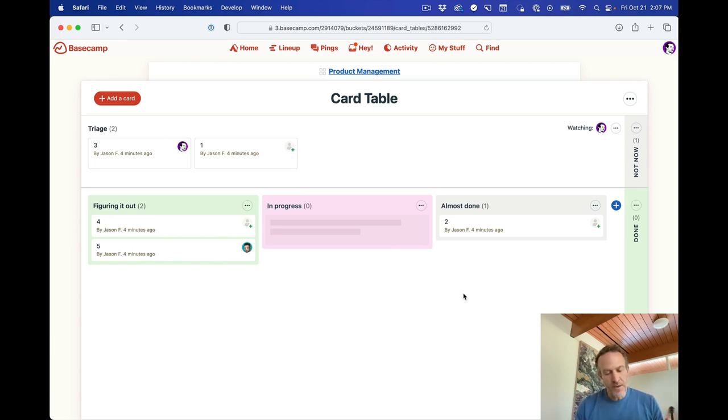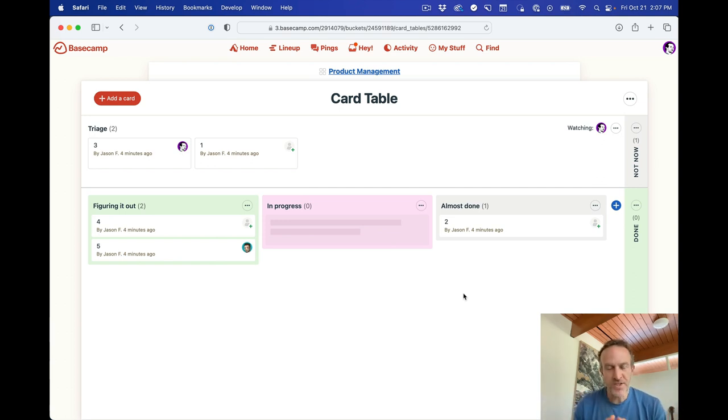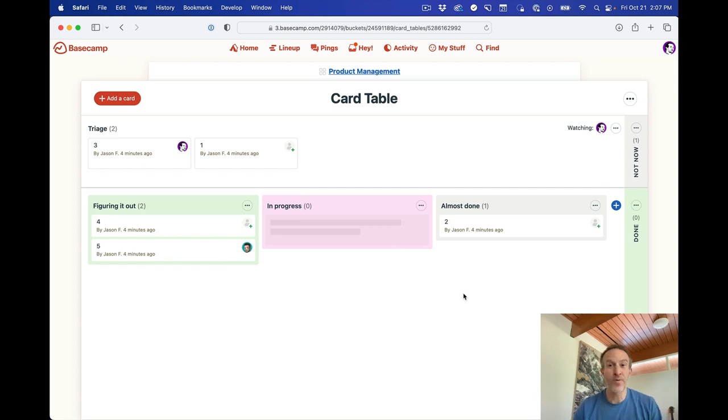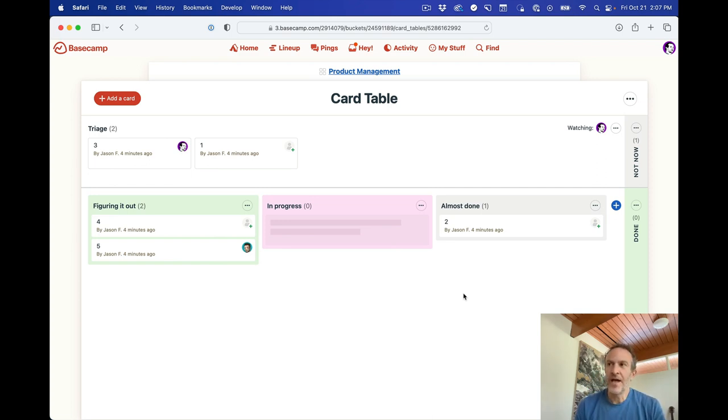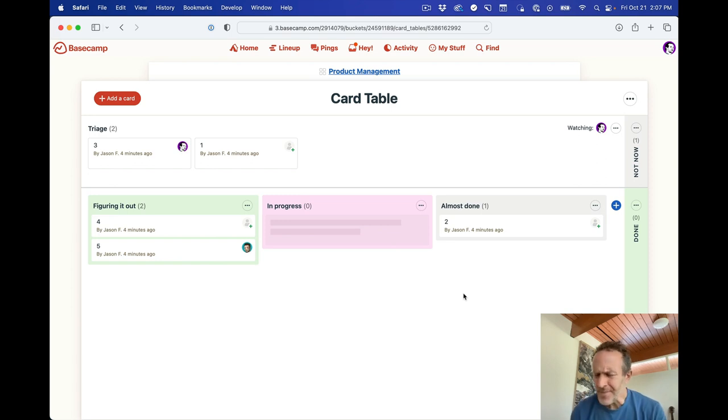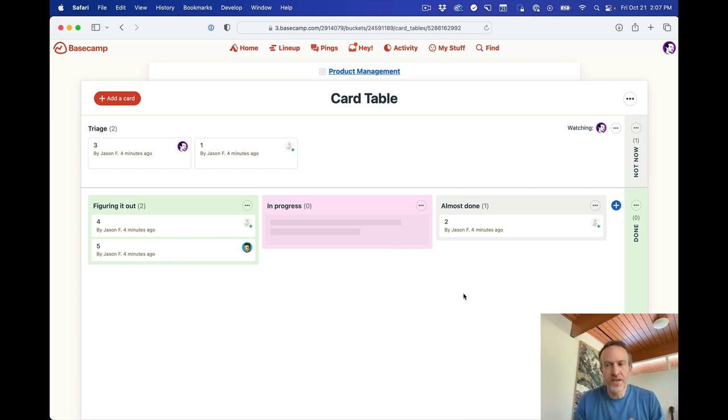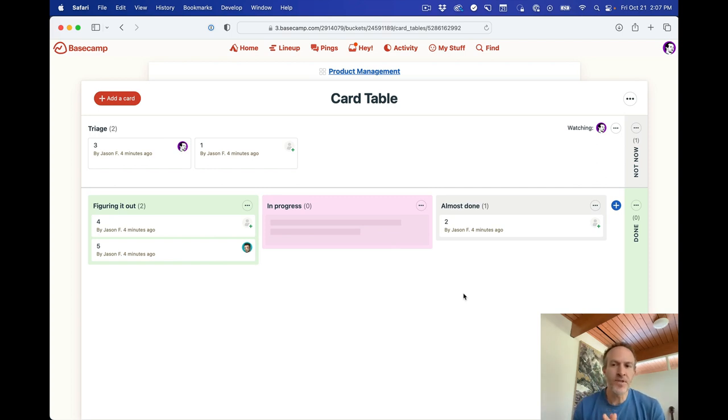Now, let me talk about a few of the other things that are new here. So typically in Kanban, well, stepping back even, forget Kanban for a second. But people are doing work. And sometimes you're blocked on something or something has to pause or you have to put something on hold for a number of different reasons. Maybe you have to look something up. Maybe you've got to involve someone else. Maybe a project's been put on hold. Maybe someone's going to be out of town. There may be a million maybes. Now, with traditional Kanban, what people would do is they'd make another column called blocked. And they'd move that item to a blocked column. In our opinion, blocked is not part of the workflow. It's a state. It's a status. It's not something that deserves its own column. Because then when you move things to that column, you sort of take them out of context. Now you're mixing a bunch of things from a bunch of different places into a blocked column. So we came up with this idea called on hold.